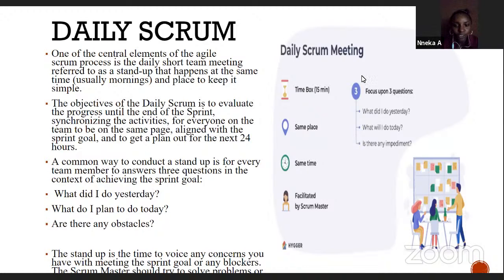So I believe you guys understood what I was saying. So the next Scrum ceremony I'm going to be talking about is daily Scrum. This is the one we know about, the one we call daily stand-up in Bincom. It's an example of a Scrum event or Scrum ceremony. And that's where you are in a meeting, probably 15 minutes or less, it should be short. And that meeting should happen during the same time on a daily basis, so that people don't get confused.